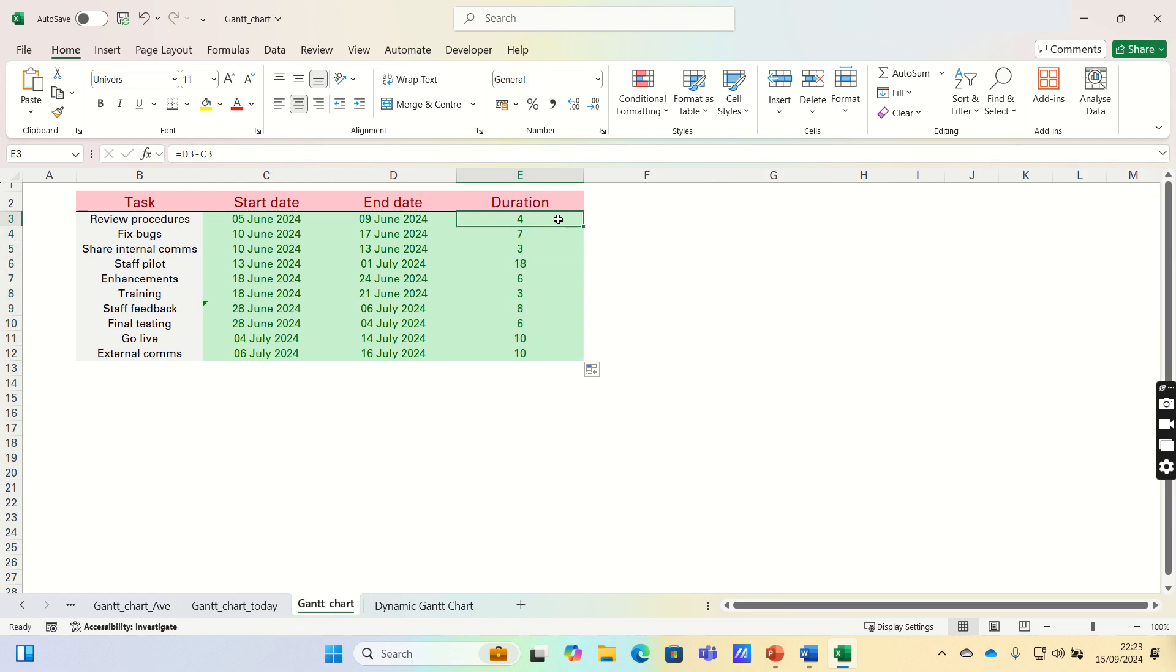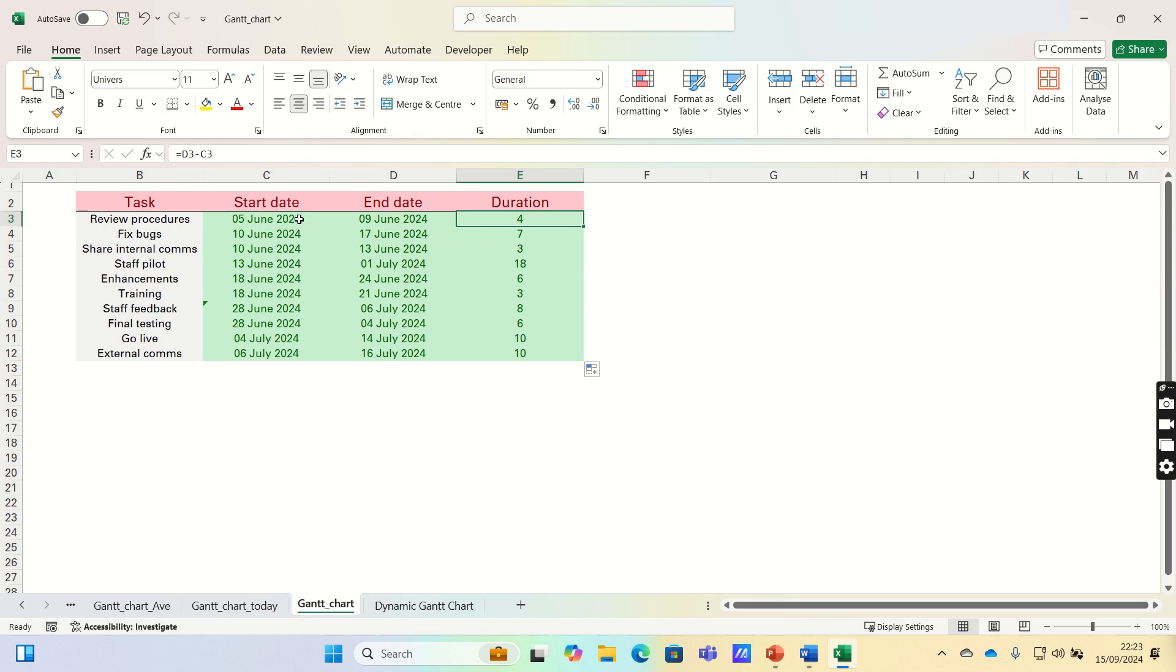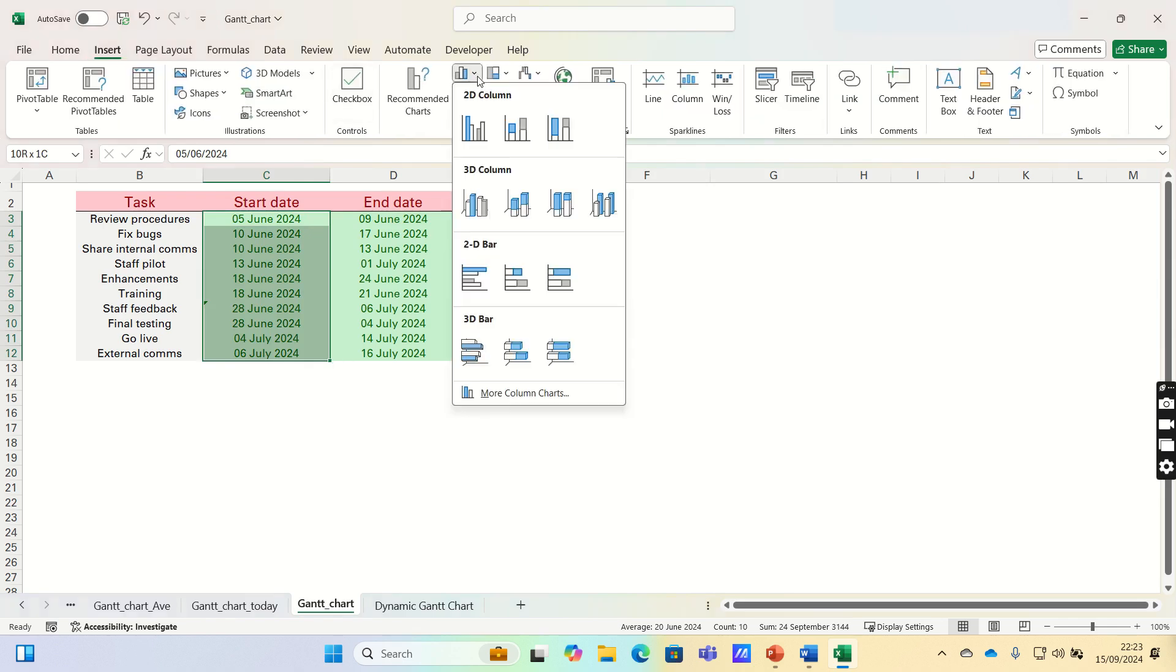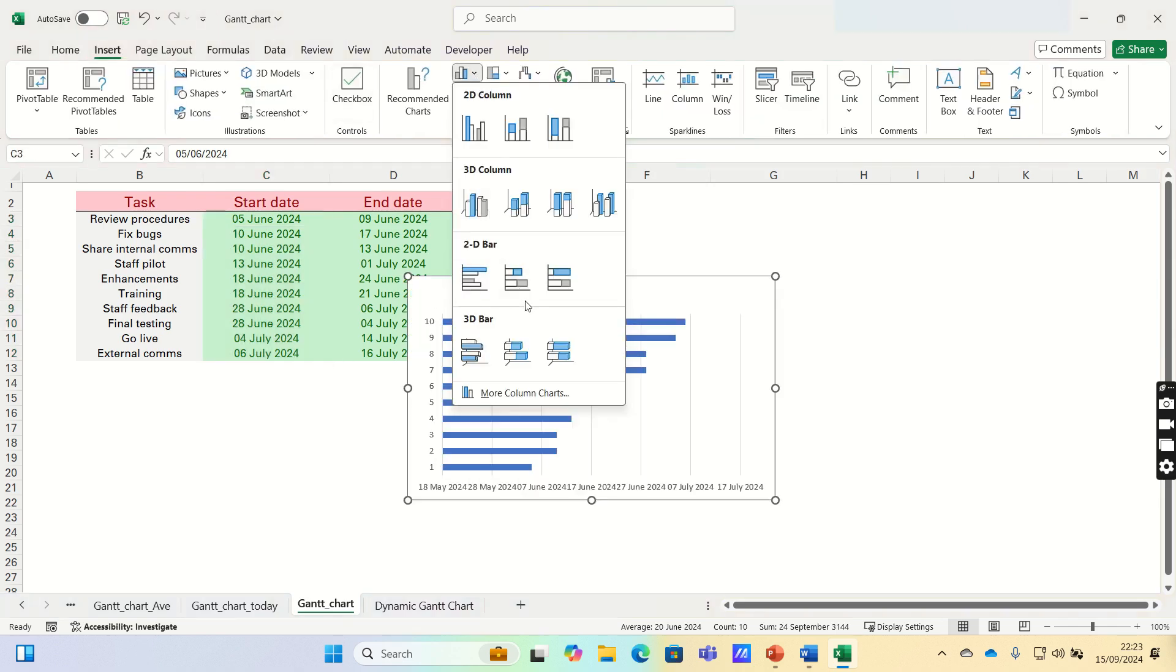Later on, we will use the start dates and duration columns to create our Gantt chart. But now that our project table is set up, we can use this information to build our Gantt chart. The first step is to select our start dates, then go into the Insert tab and select Stacked Bar Charts.